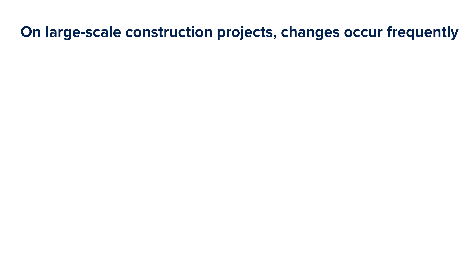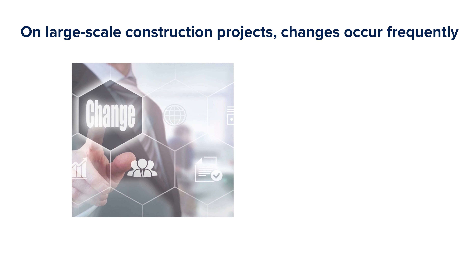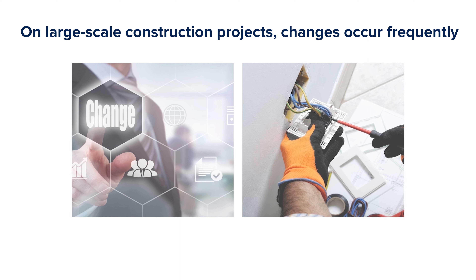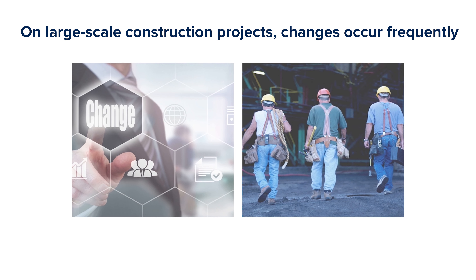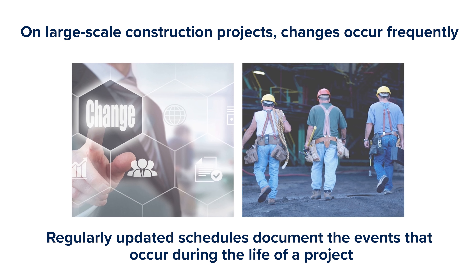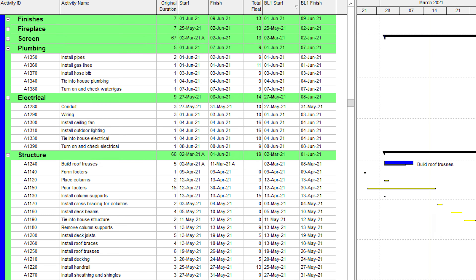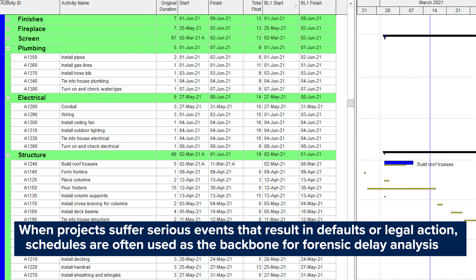On large-scale construction projects, changes occur frequently. Owners can issue change orders for certain areas of the project, subcontractors can fall behind on their work, and in some cases leave the project altogether due to poor performance. Regularly updated schedules document the events that occur during the life of a project. When projects suffer serious events that result in defaults or legal action, schedules are often used as the backbone for forensic delay analysis.